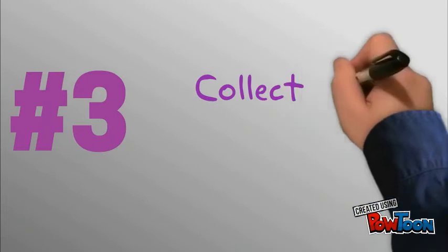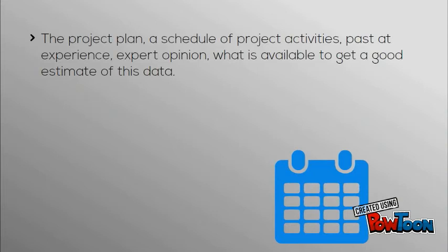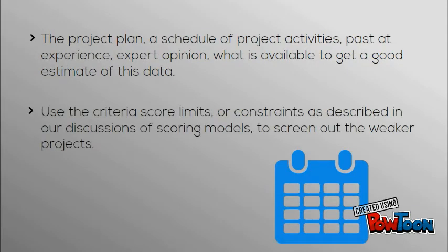Step 3. Collect project data. Project plans, schedules of project activities, past experience, and expert opinion are what is available to get a good estimate of this data. Use the criteria for limits or constraints as described in our discussions of scoring models to screen out the weaker projects.